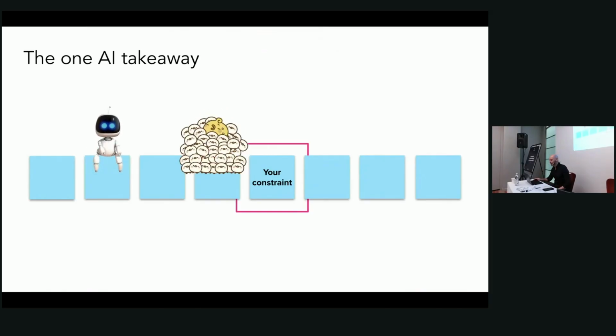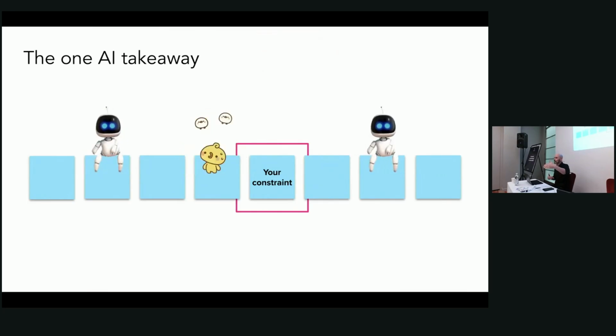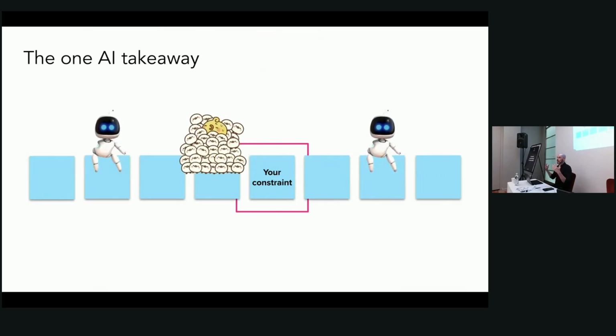That flow is not engineered for continuous delivery, right? So the problem with this is not only are we overloading people who can't move any faster when we accelerate something that doesn't have an opportunity to flow through the later stages of a process, it's that we're also starving things that are downstream, right? Every time we are downstream of a constraint, there's not enough work to actually fulfill that demand as well.